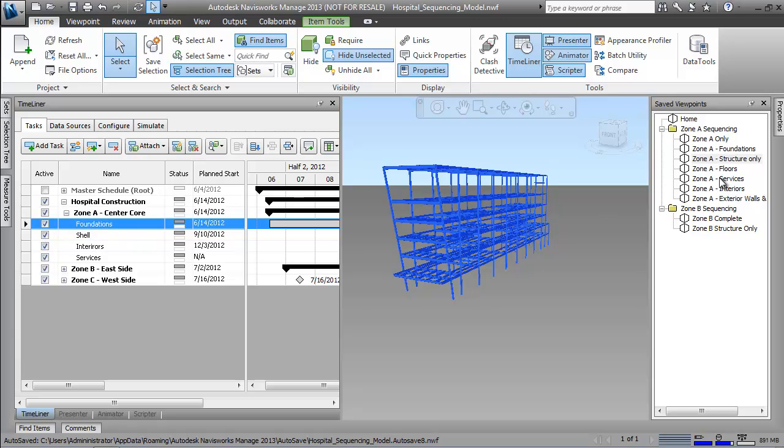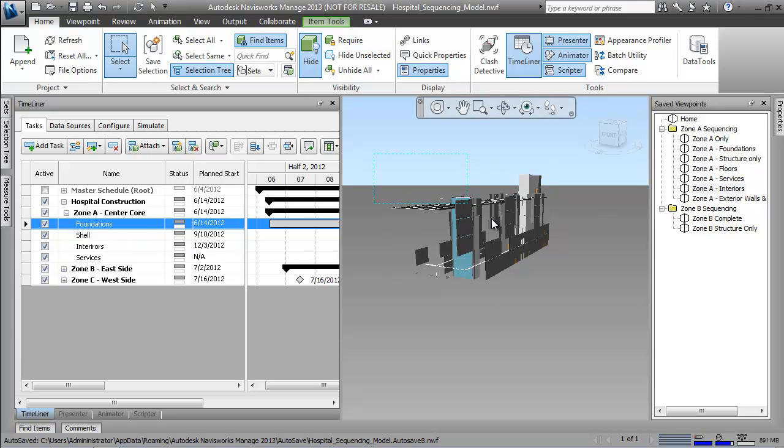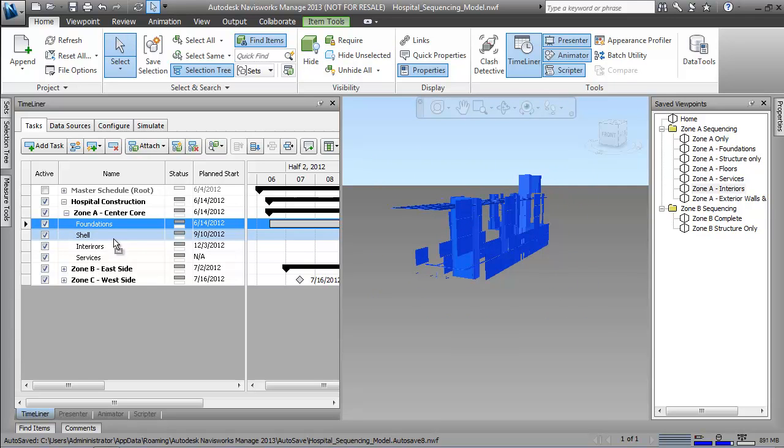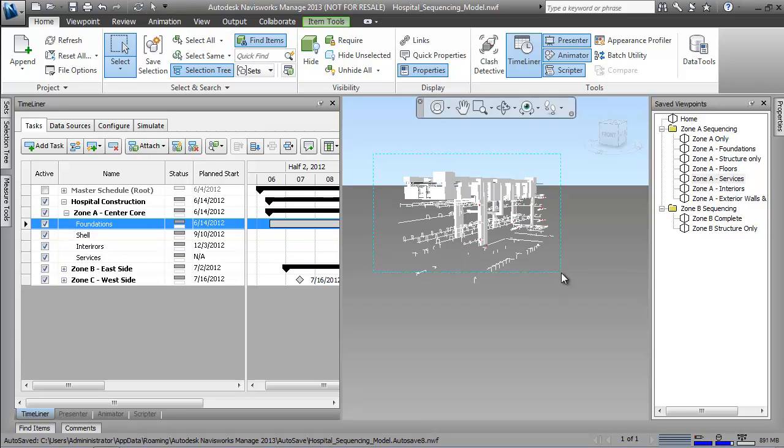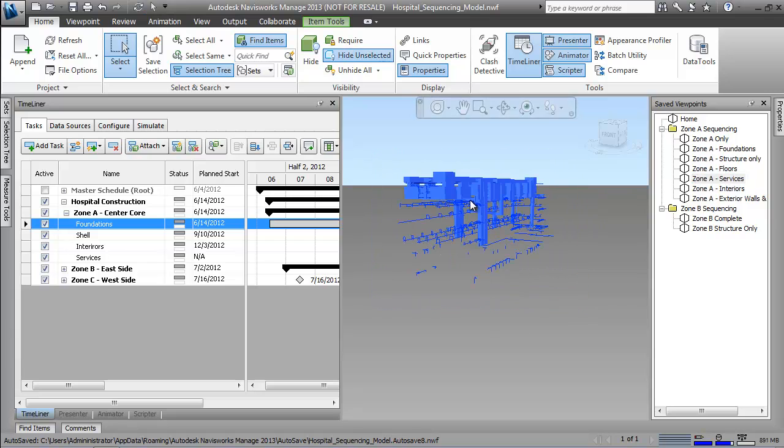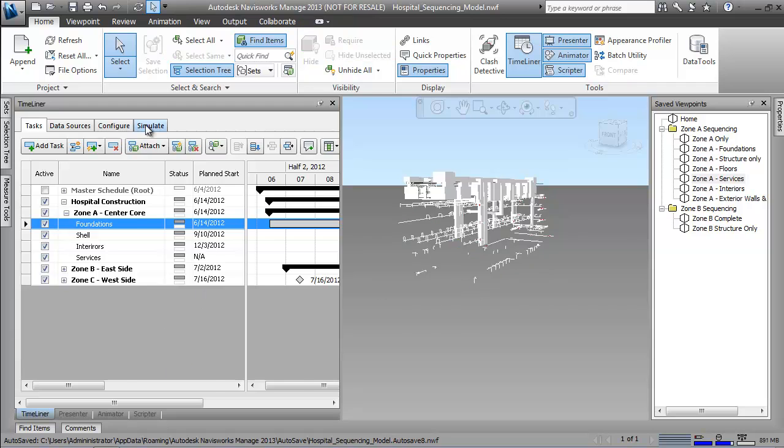We can then easily attach model elements, even at the preliminary stage, quickly to the scheduled tasks. Elements can be selected from a list, grouped together with selection sets, or in this case, simply highlighted on the screen and dragged and dropped to the appropriate task.